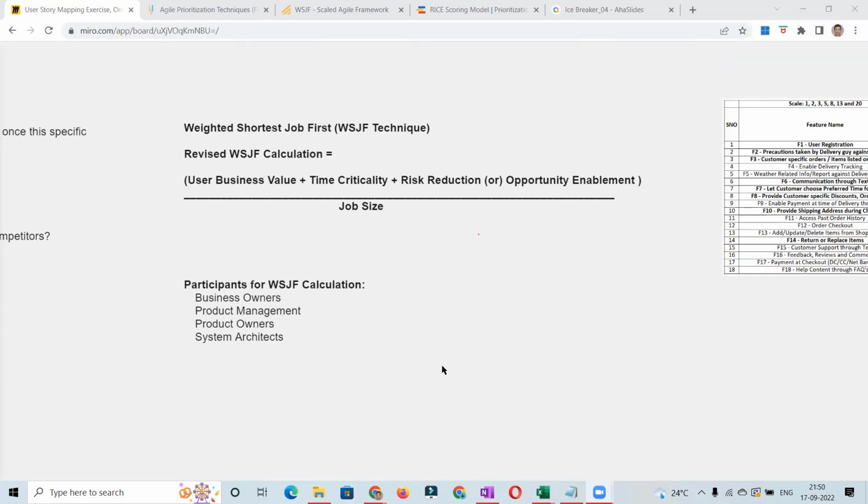So all these values for the business value, time criticality, risk reduction, they're all being quantified at this point of time. And only if the organization takes some data-based decisions, then it probably makes sense to calculate all these things, come up with a number, and then go by mathematically. We try to associate this with a number and then try to say, okay, this feature has this priority 1, 5, 4, whatever the kind of the Fibonacci sequence or whatever is made.